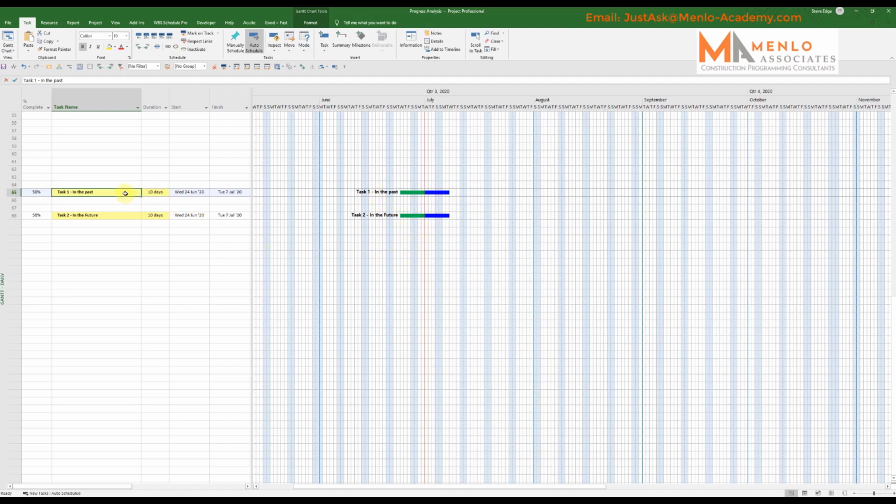So if you don't know the date when something actually started, when you're doing a status update, this is a far safer way to go, to do it like this, so that all you know for certain is that at this point it was here. And as it's a 10-day job, it assumes that the job started 5 days before today. Now you can see how turning on and off these different controls has different effects.